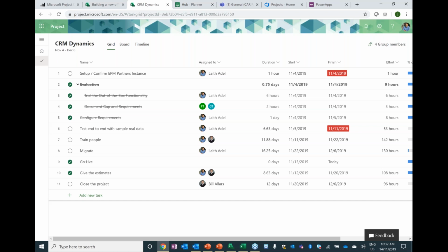And again, credit to Microsoft. I think they focused on the most used functions of their project management application rather than the other things that some of us would use, but most of us don't. I mean, the idea of a baseline is great, and most of our clients will talk about baseline, but in reality, it is something that is hardly implemented in a pragmatic, practical way that actually gives valuable insights to the organization. Having said all of that, you can still baseline by tapping into the backend architecture, the Common Data Service, which I will talk about later. But out of the box, if you just start using it, there is no button to baseline, for example.